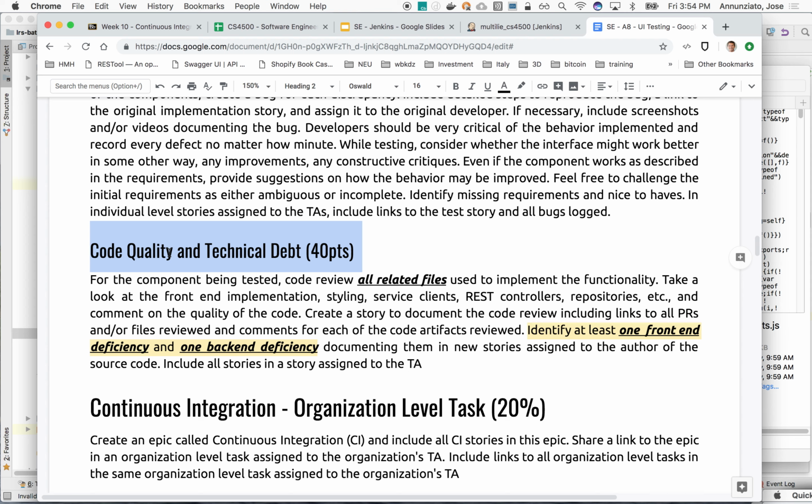Please record this as a defect, as technical debt that we have perhaps been accumulating over several weeks, that at some point we're going to have to pay down. Right? We're going to have to come back and perhaps refactor, even though it might be behaving correctly. There might be some shortcuts that the developers might have taken that are not good practice.